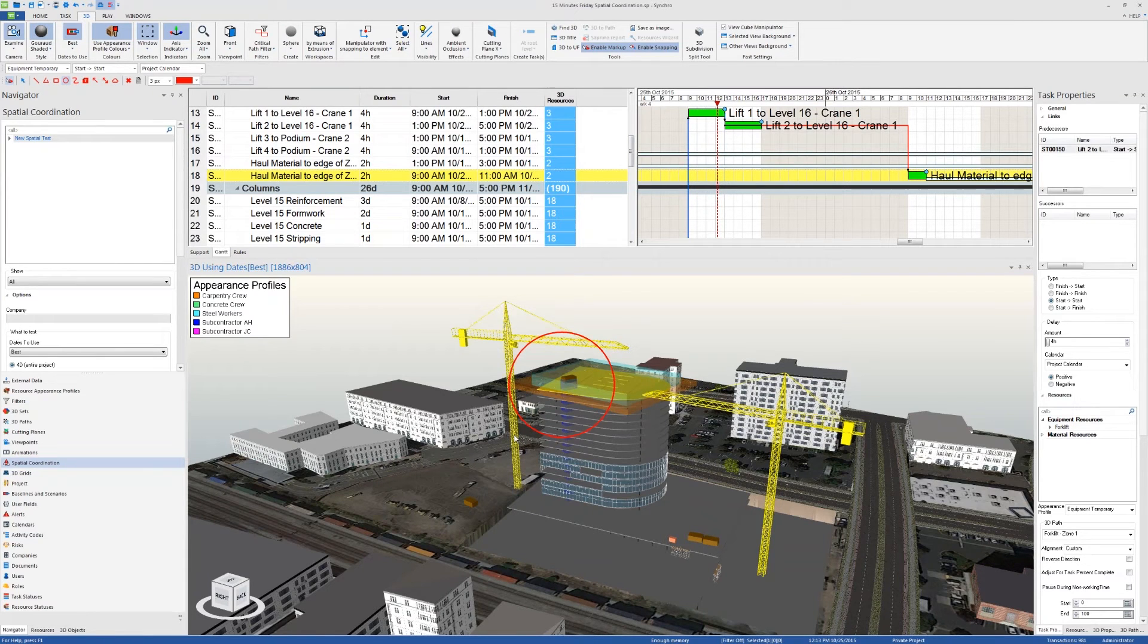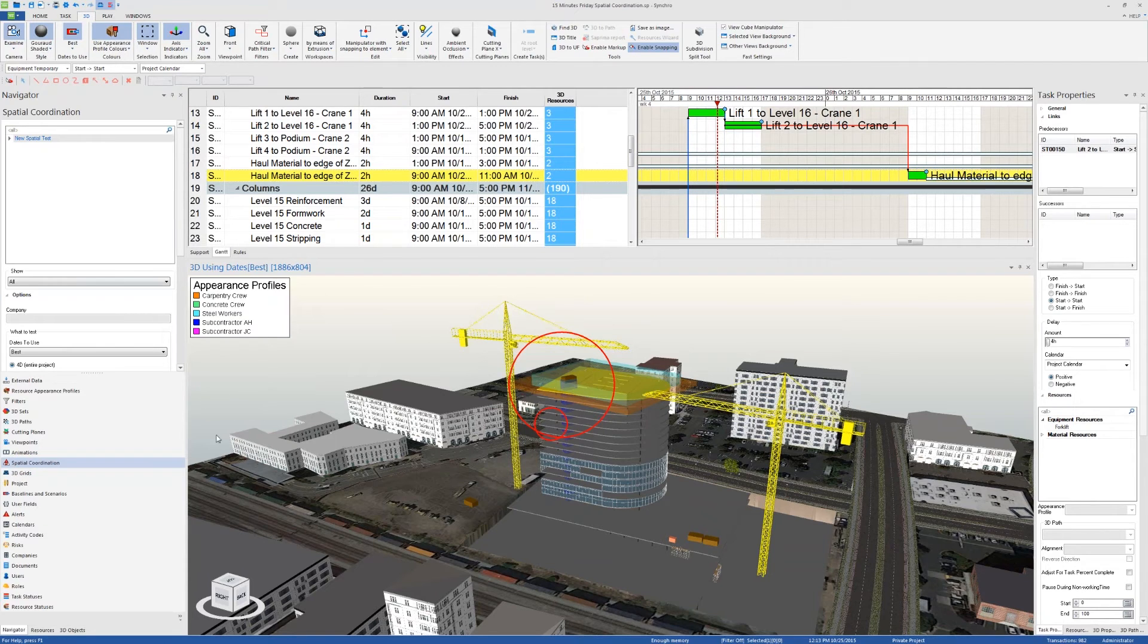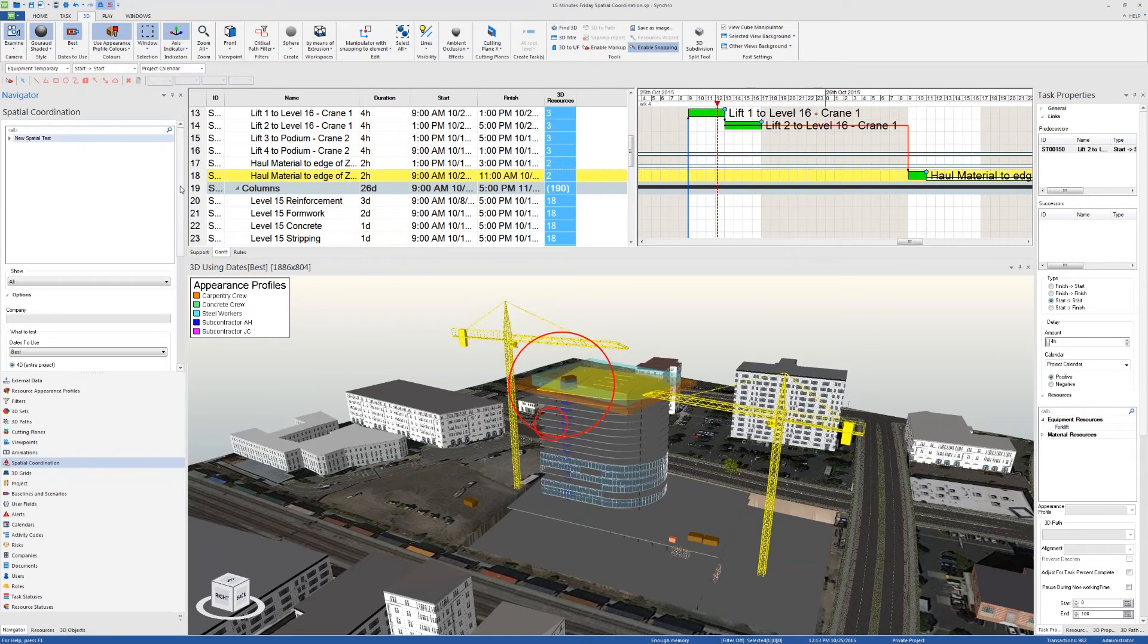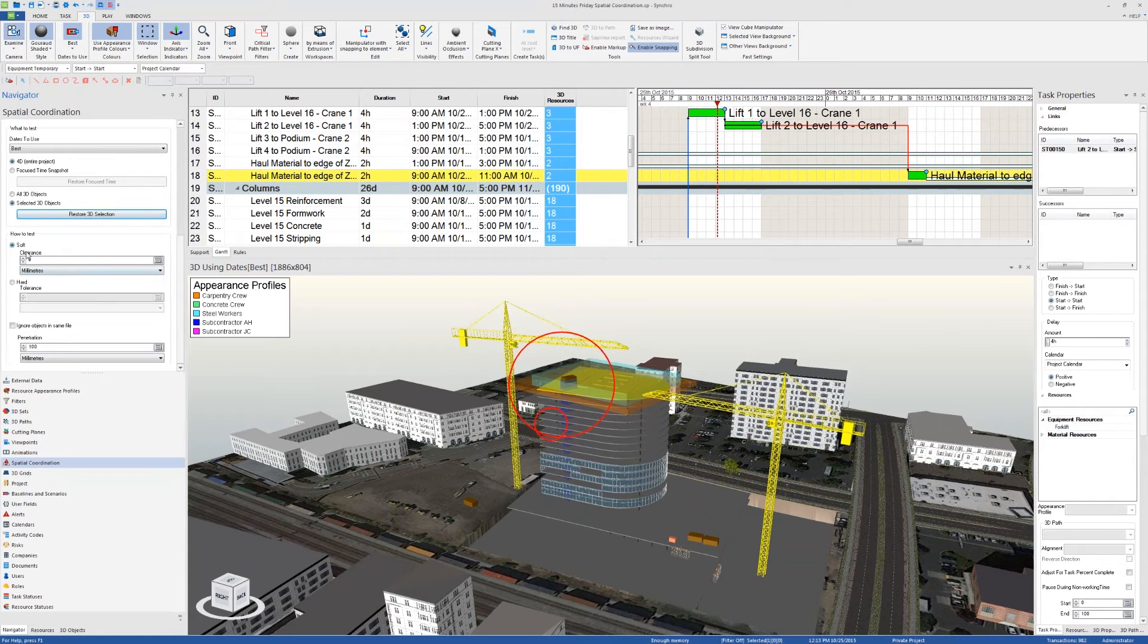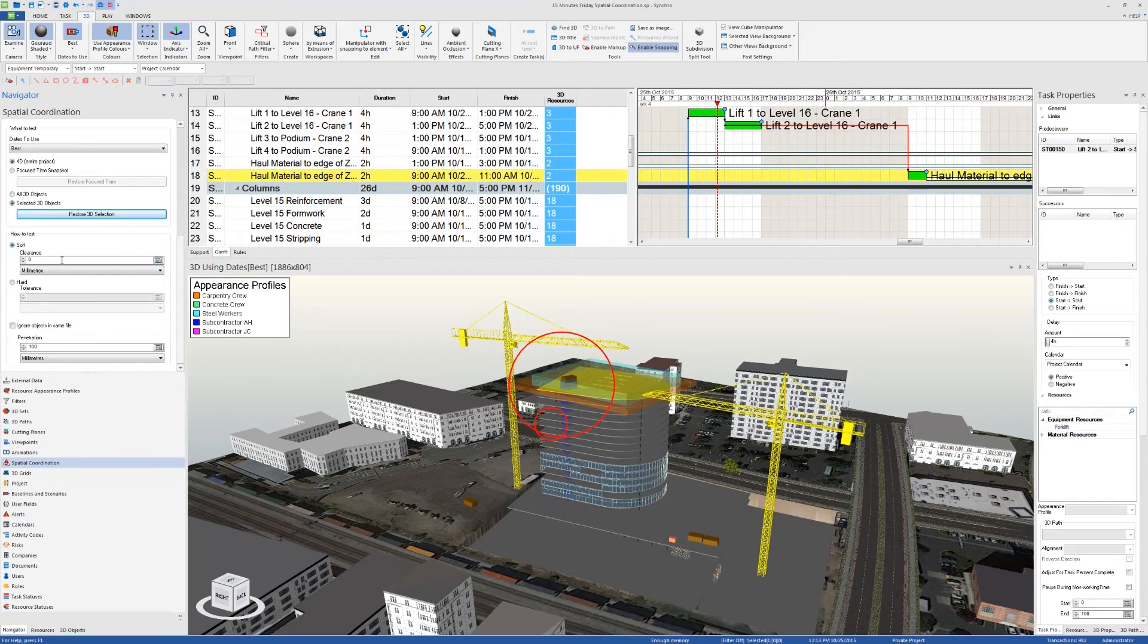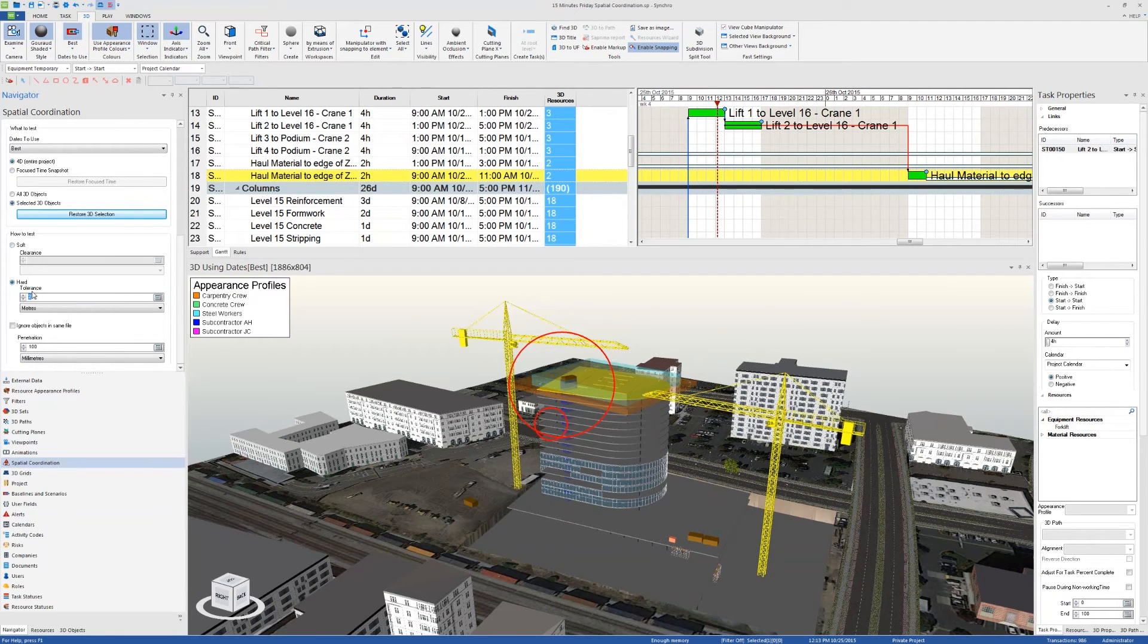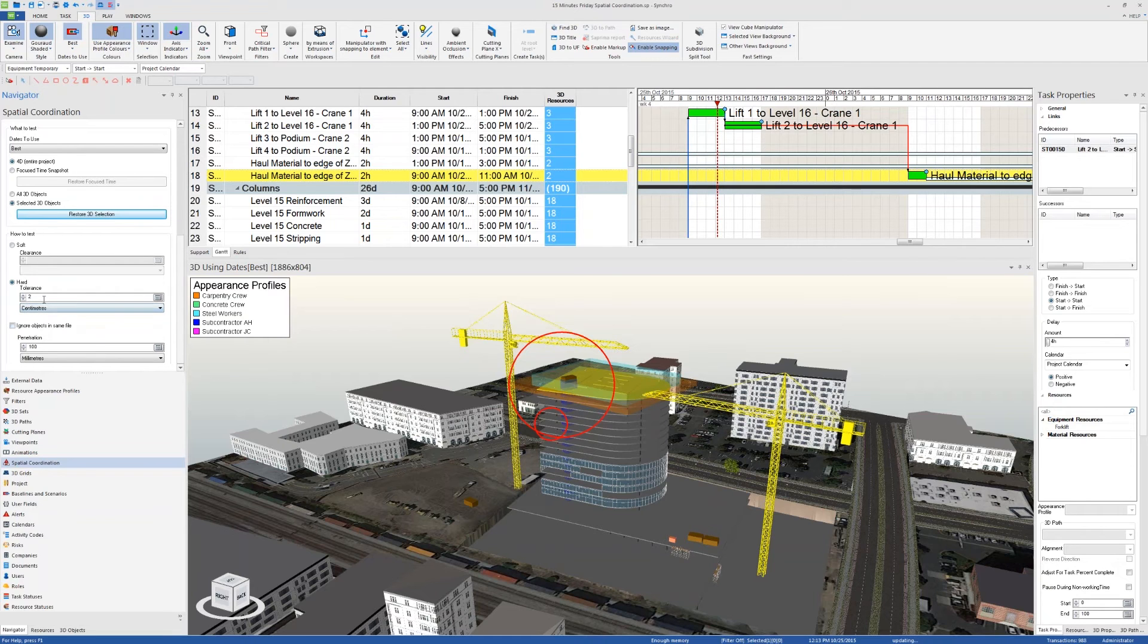Okay, great. If anybody has questions, please submit them. There's a couple here. Can you explain the difference between a soft clash and a hard clash? Yes, you can see that if you click on the spatial coordination test that you created, you can edit the options to select if it's a soft clash detection type or hard clash. A soft clash will allow you to edit a clearance, so if you have an object that's not clashing with another object but getting as close as a thousand millimeters or two meters, it will detect that as a clash. If I choose hard, then I can set a tolerance, which is the opposite of the soft clash, which means that if two objects only clash for a distance that I define, let's say two centimeters, it will not be detected as a clash.